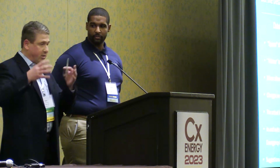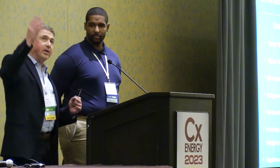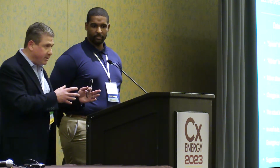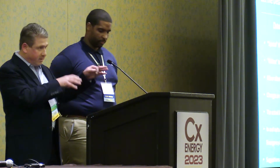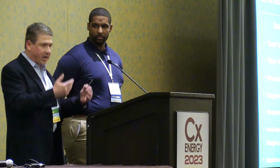Information on all those different types of procedures, emergency procedures, standard operating procedures. You may have an H&S team that has their own vision of how their systems, let's say in a lab building, are going to operate in an emergency procedure. Well, you perform commissioning and you verify that, actually, when emergency power kicks in, the fan within the biological safety cabinet is not running. It's not connected to emergency power. So you have to communicate that to the H&S team, test that system to that procedure, and ensure that the owner is familiar with and understands that, and if they accept it, that's fine. If not, then you need to communicate to the design team that that's not the right design, and a change is required.